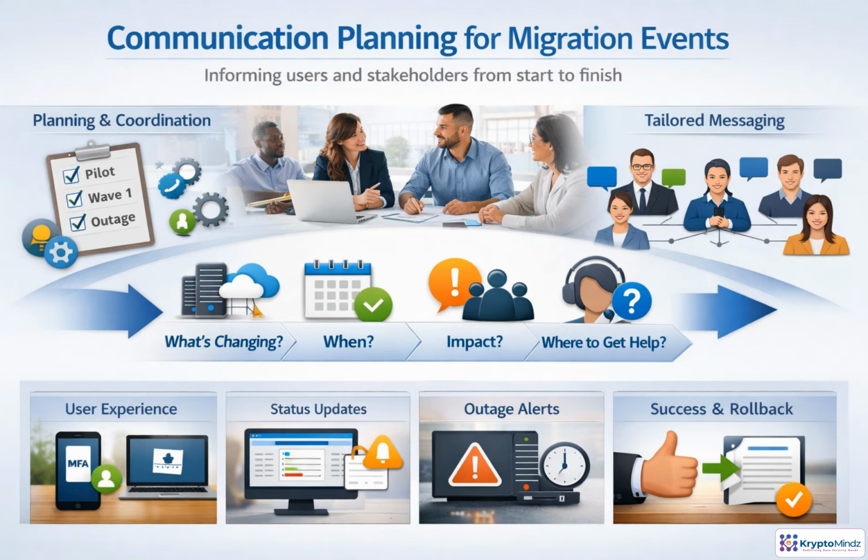Executives need risk and business impact. Help desk teams need scripts and escalation paths. End users need clear actions and timing. Prepare status updates, outage notices, success messages, and rollback communications before the event, so the team can respond quickly and consistently.